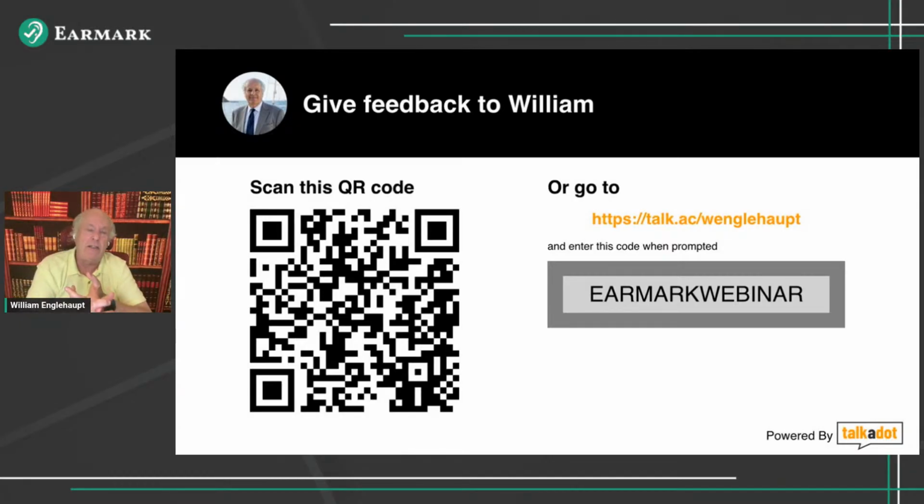But just as an aside, the other issue with generating review notes, particularly with things like walkthroughs, is that those tend to also linger quite a while in the system, just because of the nature of when they're done. So what you often find with these kinds of review notes is not only are we generating the volume, but it's taking longer to get them cleared and back refreshed into the system. And many times it's months. I find teams, for example, that do walkthroughs in the early spring or late spring, early summer, have review notes lingering in their files well into the fall.